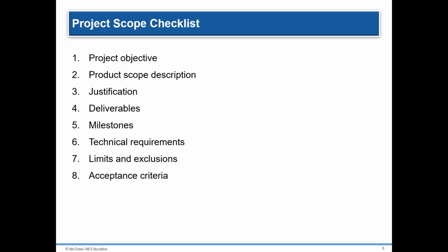The next step is to define major deliverables, the expected outputs over the life of the project. For example, deliverables in the early design phase of a project might be a list of specifications. In the second phase, they could be software coding and a technical manual. The next phase could be to test prototypes. The final phase could be final tests and approval of the software.